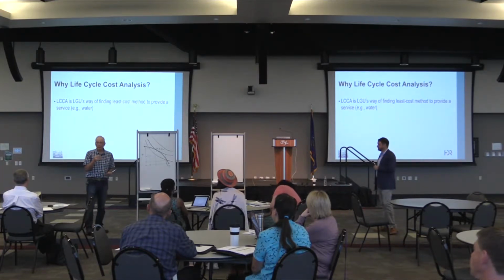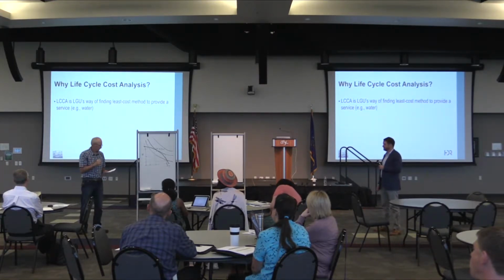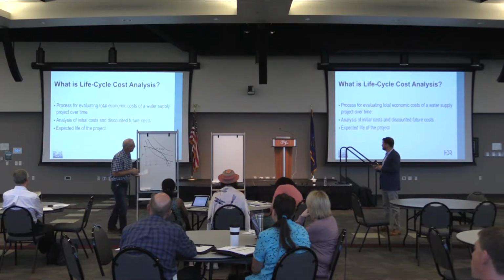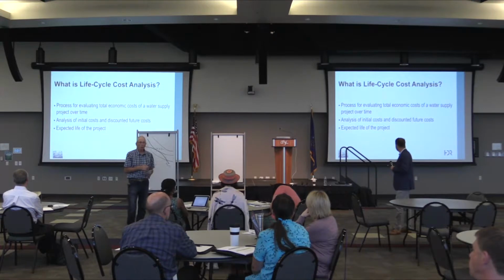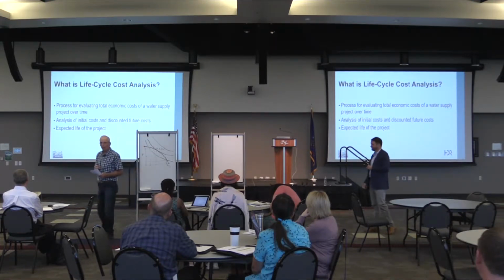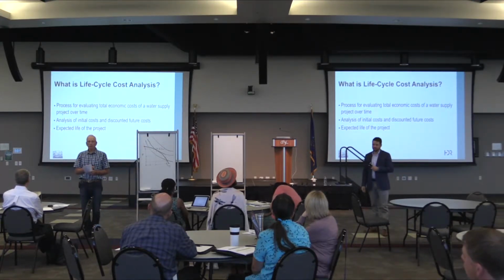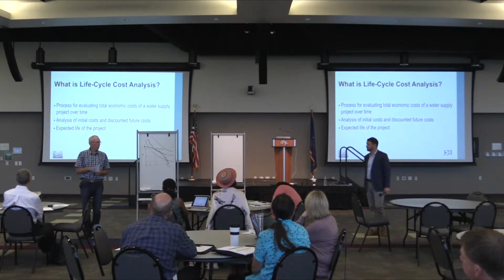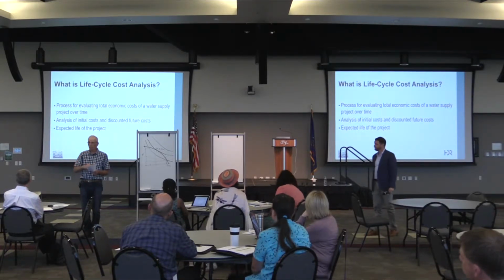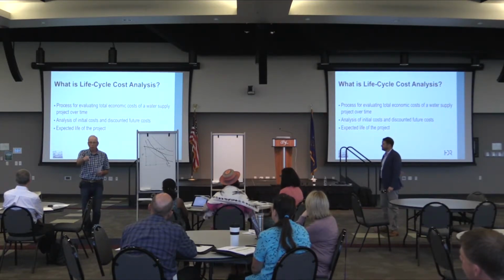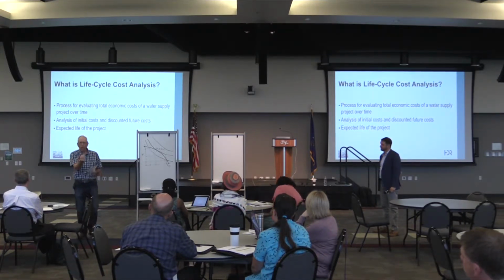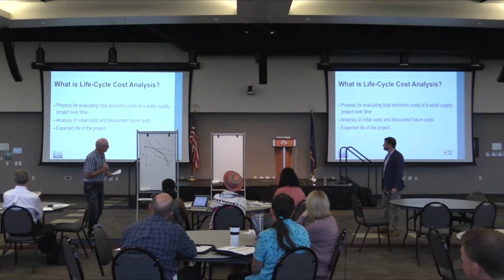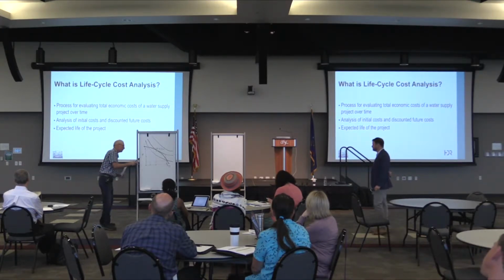It gets a little tricky when we talk about real and nominal, but I'll talk about that in a second. Okay. What is life cycle? Process for evaluating total economic costs of a water project over time. So we're in the present, and the water project, we might have a whole bunch of costs up front, but we might also have costs in year 20, year 40, and how do we bring those costs back to the present? Analysis of initial costs and discounted future costs.